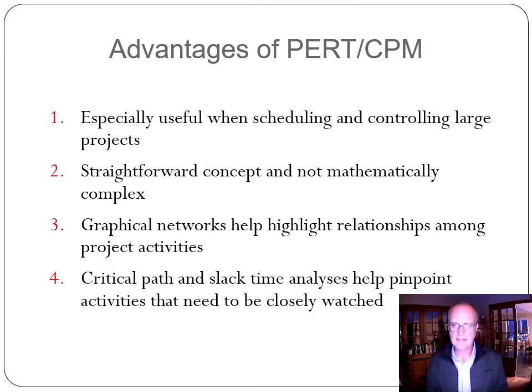And the critical path and slack time analyses, which you'll see in the next video, help pinpoint activities that need to be closely watched. Critical path means it has to happen on time in order for the project to finish. If something has slack or excess time, it's not as important that it gets done exactly on time.